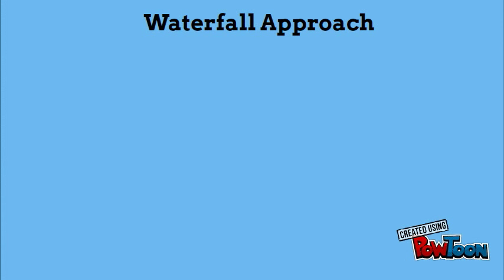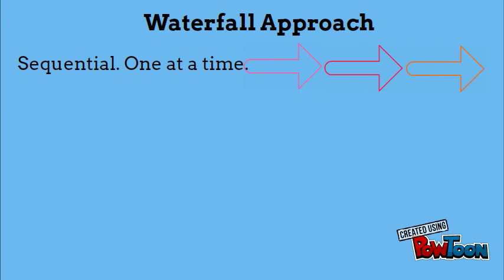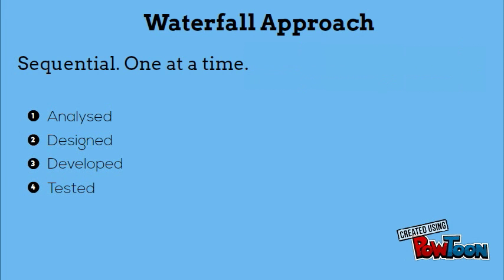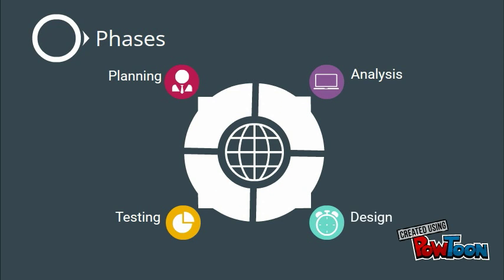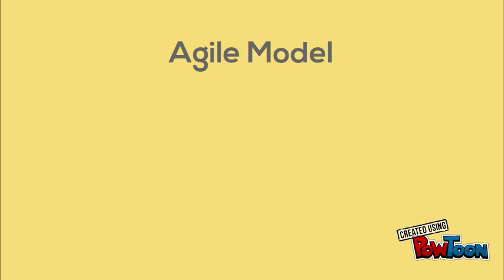Traditional software development projects follow what is commonly known as a waterfall approach, where each phase of the software development lifecycle is completed in detail and in sequence, one stage at a time. With waterfall projects, the whole project is analyzed, then designed, then developed, then tested, and then deployed. Sometimes projects are cut into multiple smaller phases to make them more manageable. But still, these phases tend to work roughly around 3 to 6 months or maybe even more.